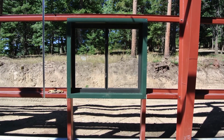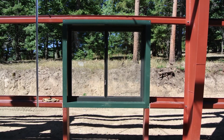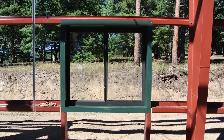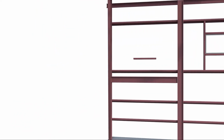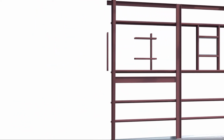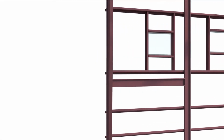Here, an actual field-located window frame kit with no vertical adjustment opportunities and required modifications in the field is shown. Here shows flexibility in window placement both vertically and horizontally. It is important to provide proposed window locations to avoid relocation of bracing in the field.